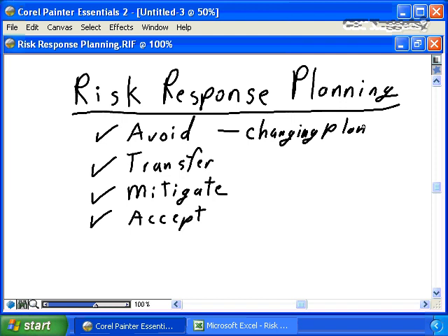In advance, before the project even starts, we take the appropriate avoidance strategy. We change our plan, and instead of providing 5 days of training, we go back to our training vendor and say, we don't believe 5 days is enough. We want to ensure our project is going to be a success. We're going to build that additional training into our plan on day 0.